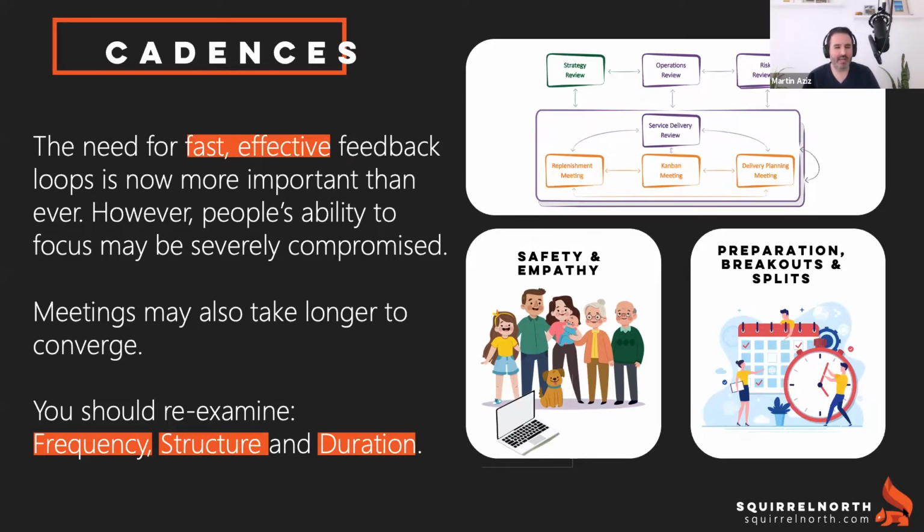That may not be the case. If your market is having rapid change and experiencing all sorts of unexpected things, then committing to fewer things but replenishing much more frequently may be what allows you to adapt.